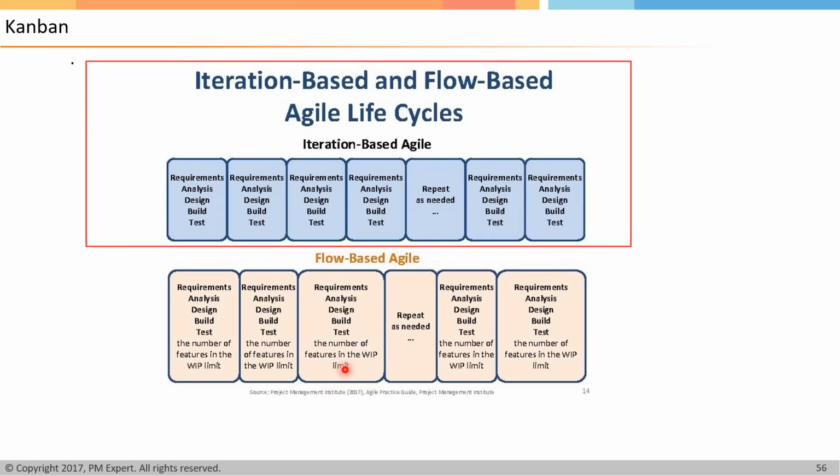So I want to understand the process, how first Kanban happened and then the Scrum process. I think we should use Scrum and Kanban hand in hand rather than one after another. Every process of Scrum will be retained. The only thing is Kanban will be added. For example, as I move from sprint planning to retrospective, you can divide work into various stages. That is the only thing you are adding, along with the pull system concept of Kanban, and you are making all the work done more transparent by having Kanban boards. That way you can have Scrum and Kanban together.